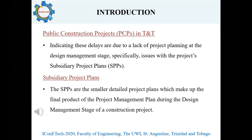Looking into these sources of delays shows that they are due to a lack of project planning at the design management stage, specifically issues with the project's subsidiary project plans. Now, what are subsidiary project plans exactly? These are the smaller detailed plans which make up the final product of the project management plan, prepared during the design management stage of the construction project.